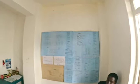That is after you've gotten all the approvals and gone through the procedure of the requirements of the government. You spend 500,000. This is called preliminaries. After we have finished that, you start with the construction part. The construction part will depend on your design, on what you want to build. So we normally do a bill of quantity. The bill of quantity gives you an estimate of what you want to do from stage one, foundations, ground floor, first floor, and so on.